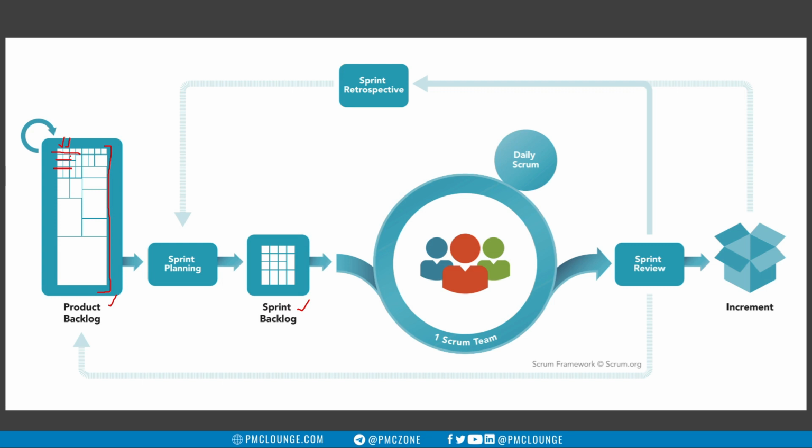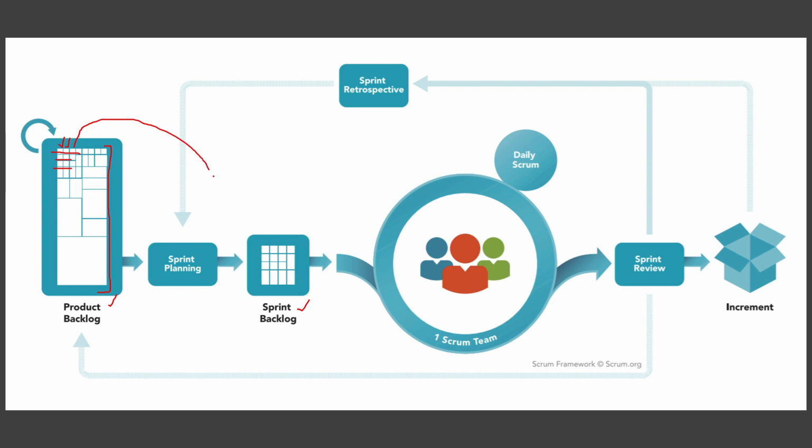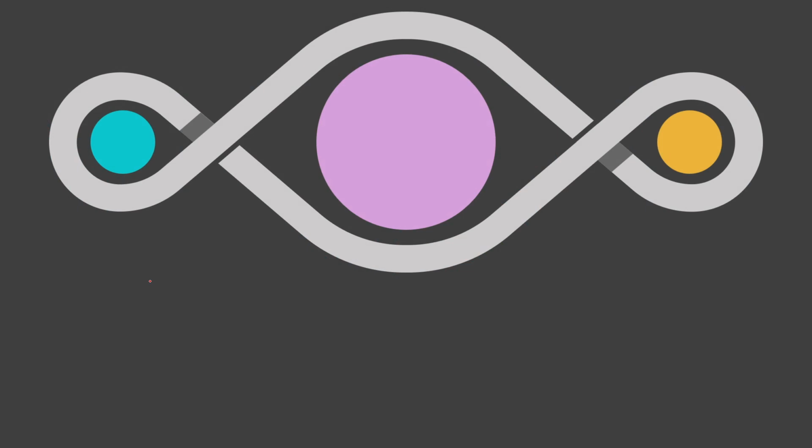There has to be a definition against which a backlog item can be measured to figure out if it is ready to move from the product backlog to the sprint backlog. So that is where definition of ready comes into the picture. If a backlog item is meeting the conditions to move from product backlog to the sprint backlog, then it is essentially ready. So that is what the definition of ready is essentially talking about. But we'll take a look at the difference between the three here.